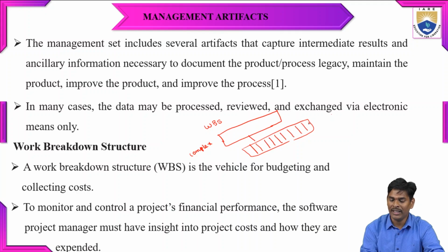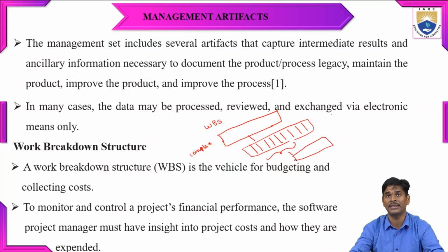After completion of each and every module, they can again be clubbed together as unit modules. By doing this, the structure can be broken down and it is very easy to calculate the budget and the cost, and to handle the various things that happen in the project. Work breakdown structure is mainly used for handling complex projects.